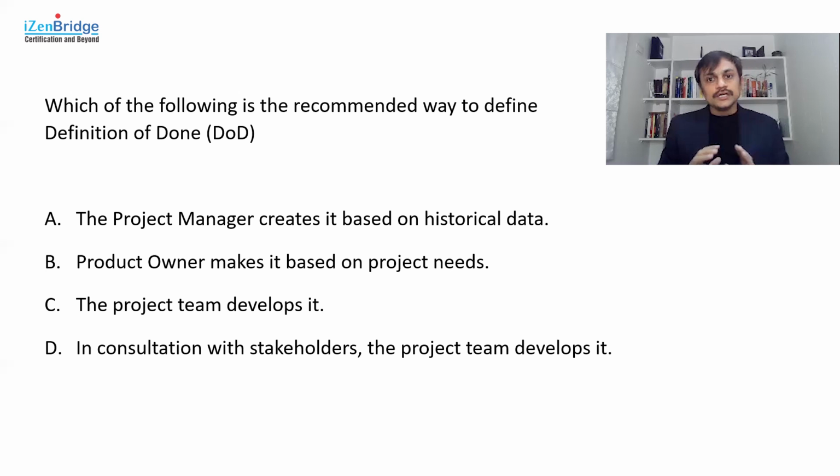But the definition of done is more at a deliverable level, which is common for multiple product backlog items. And we can understand the first line in definition of done might say meet the acceptance criteria, which are defined by the business. And then it may have other things as we go along. So the product owner cannot define it alone because the definition of done includes some internal quality points, quality checks as well. That particular knowledge, that particular insight, the product owner alone may not have.